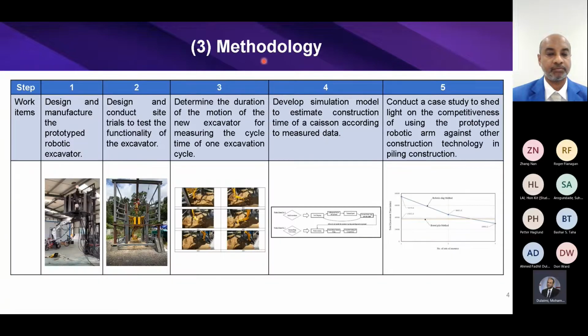The methodology is presented here. First of all, our team designed and manufactured the excavator, and then we conducted a site trial to test the functionality. Then we conducted time measurement of the excavation motion to record a cycle time. This recorded cycle time will be used in the simulation model to estimate the construction time of a Kherson. Finally, we conduct a case study to evaluate the competitiveness of this excavator against the common piling construction method of bored pile.